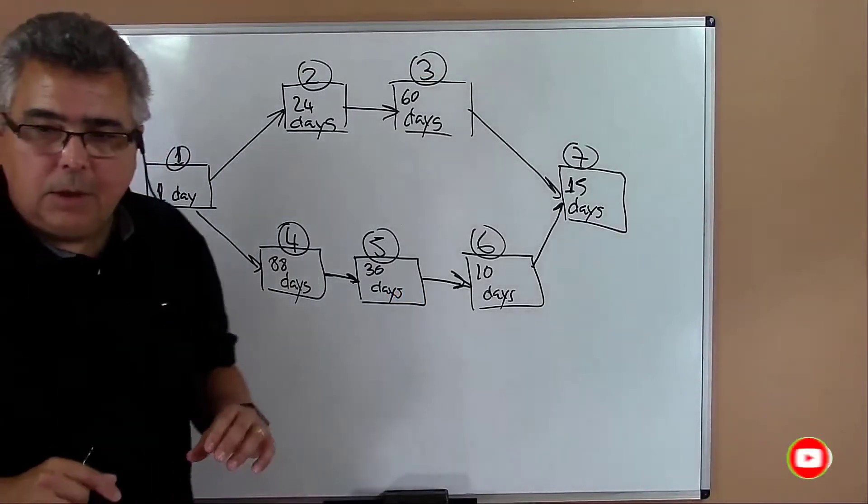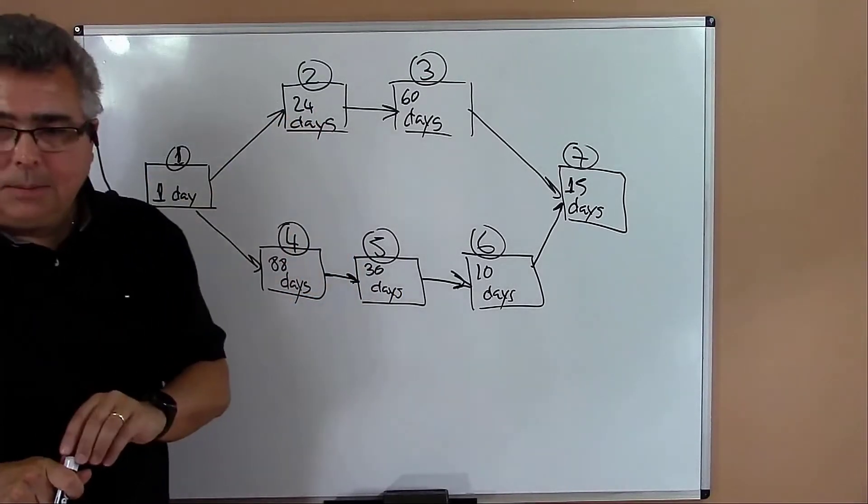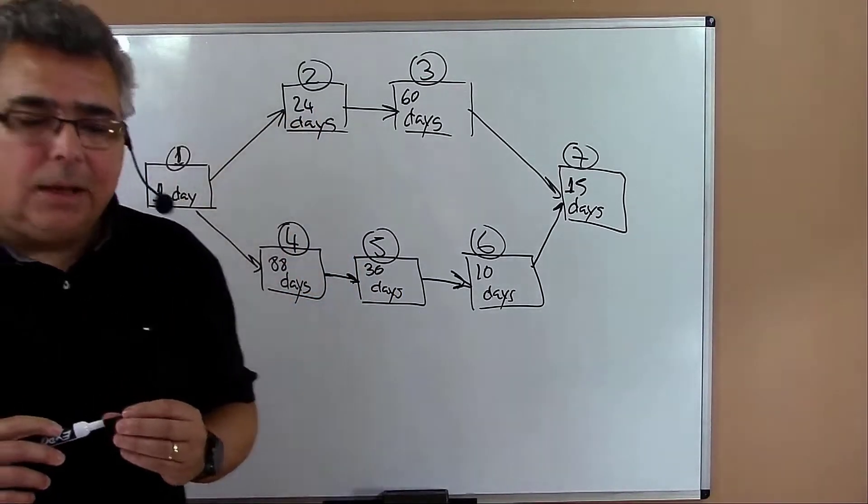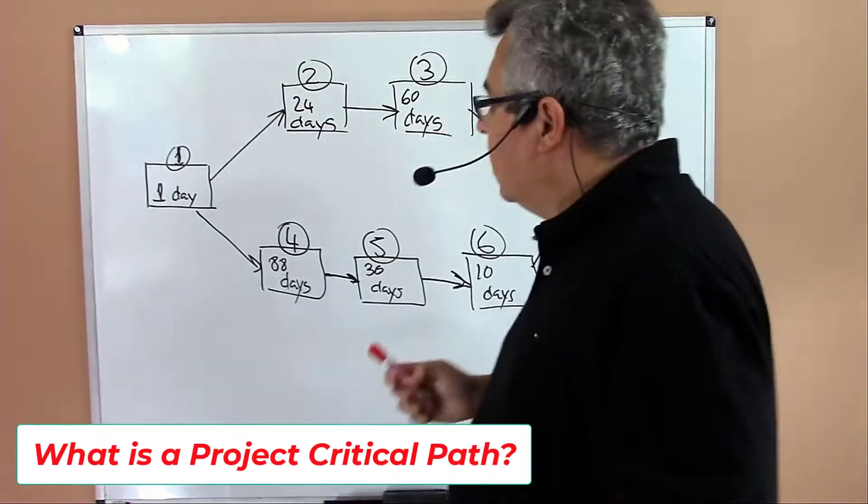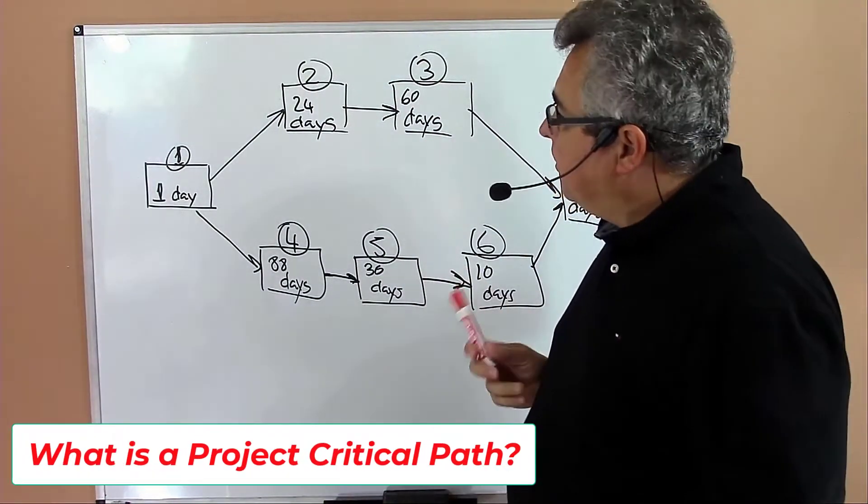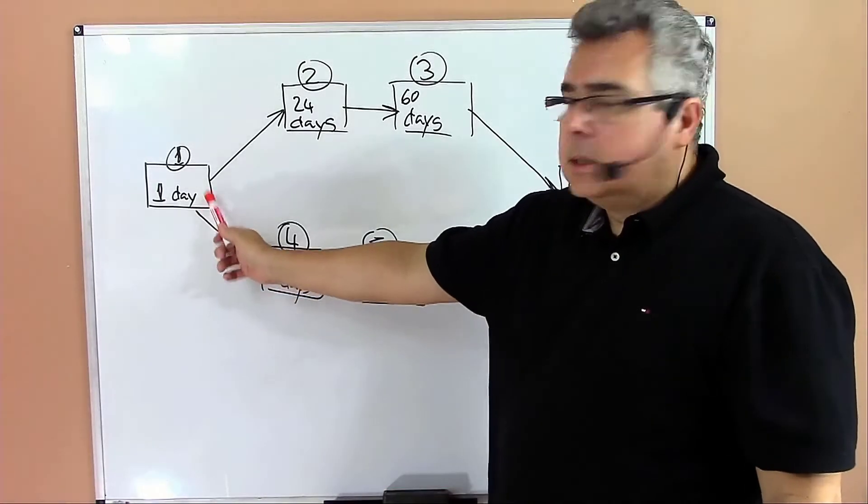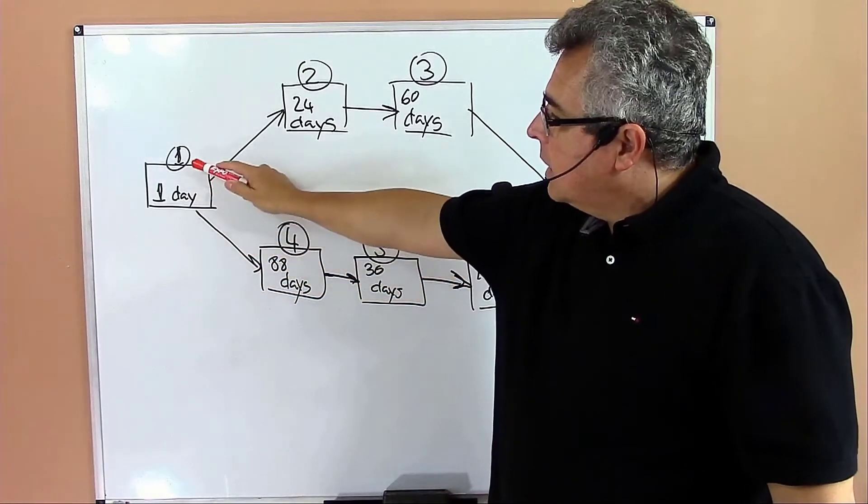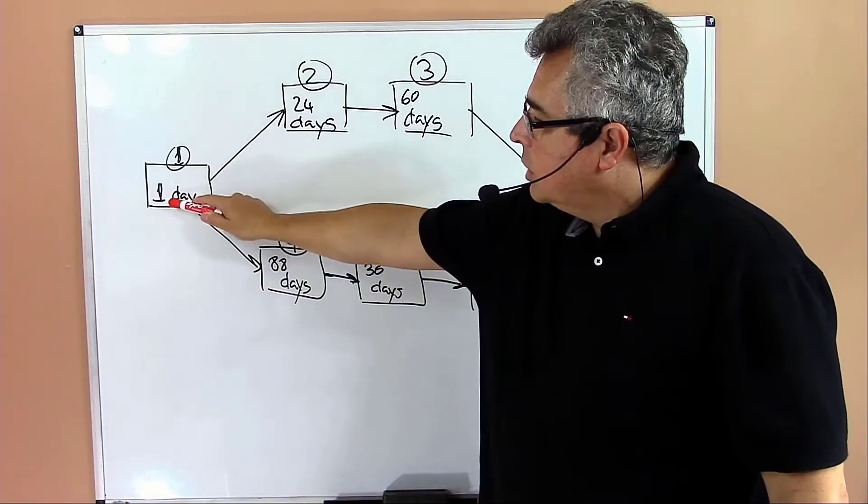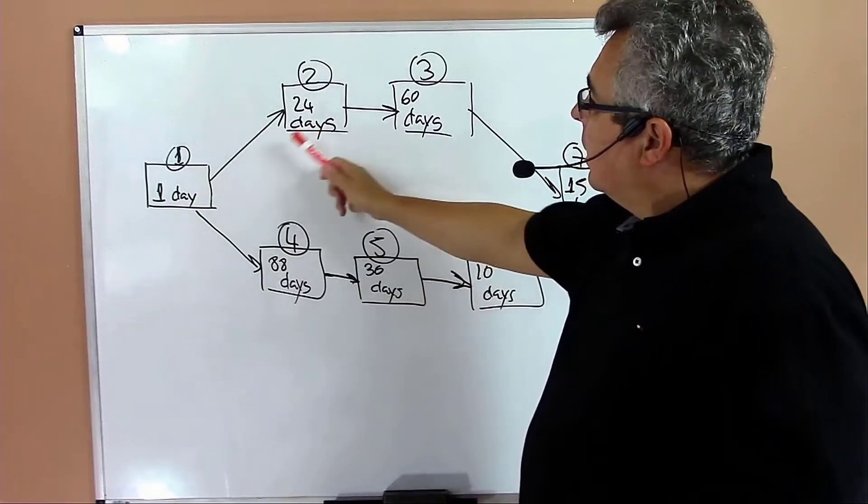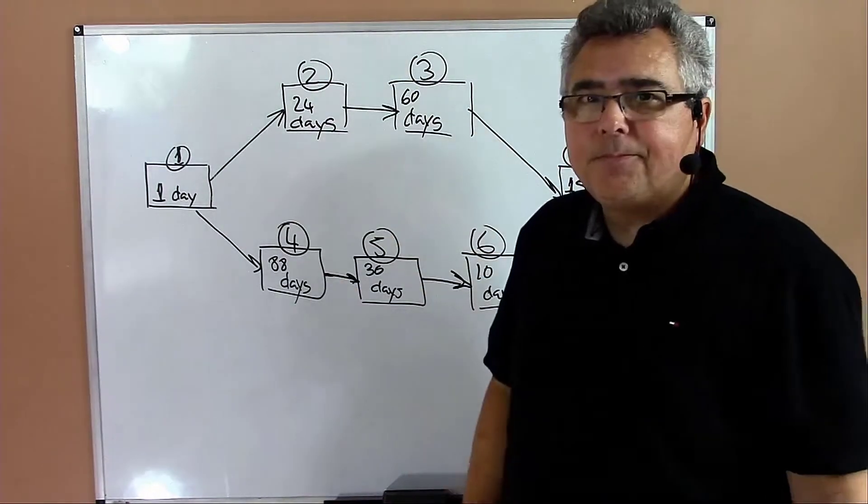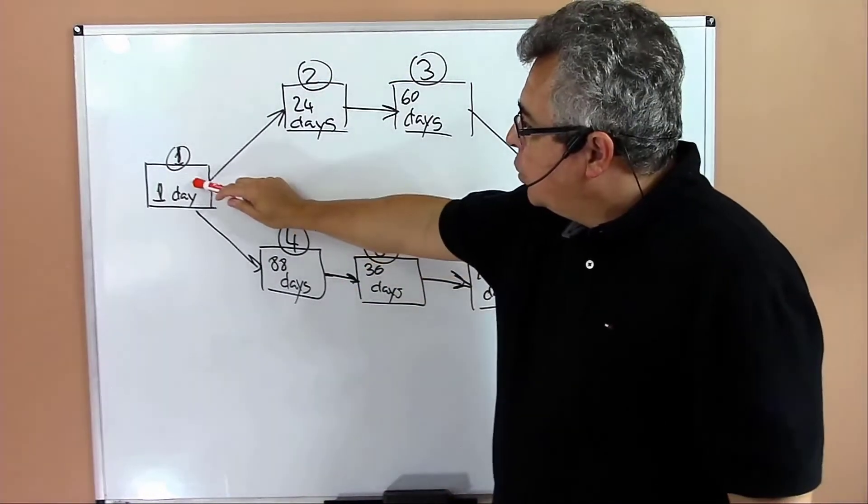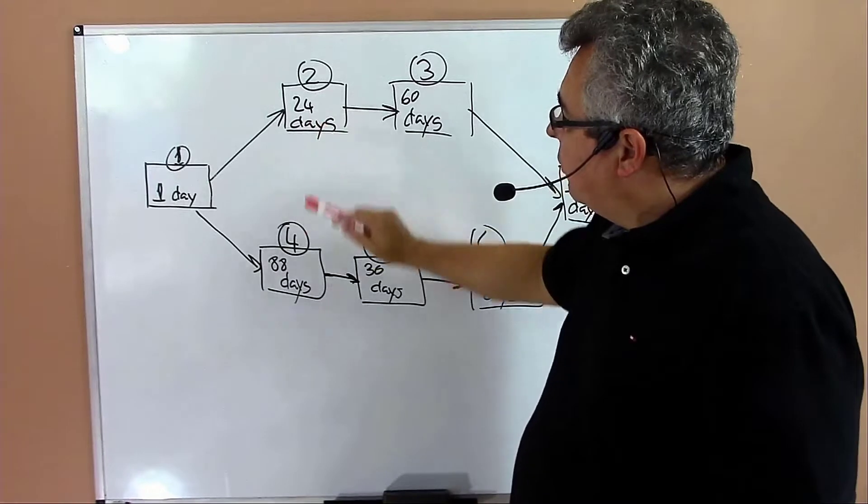So we have the project, let's understand and read that project. The first task is that activity one has a duration of one day. Once I finish activity one, I can start activities two and four. So activity one is a predecessor of two and four.